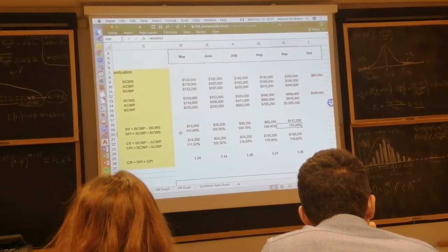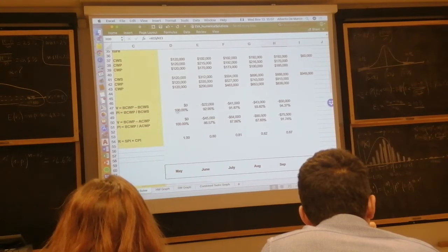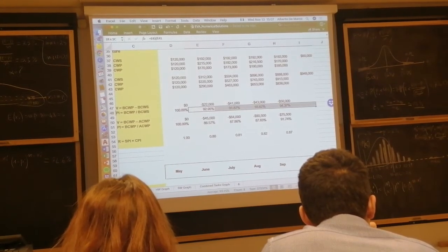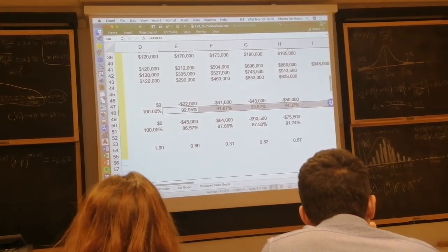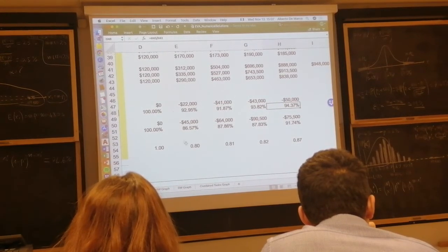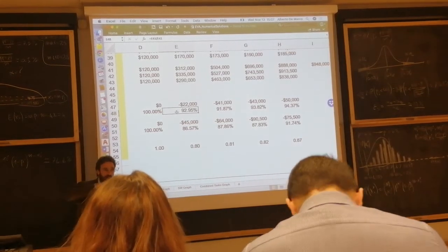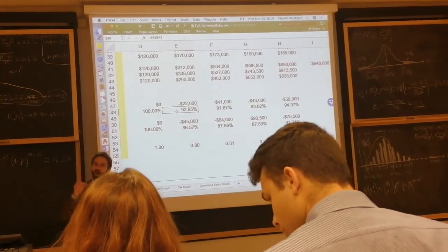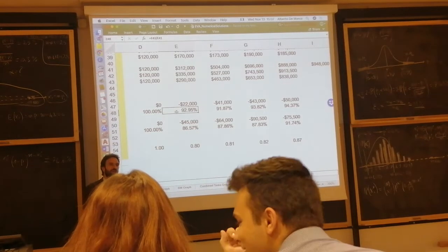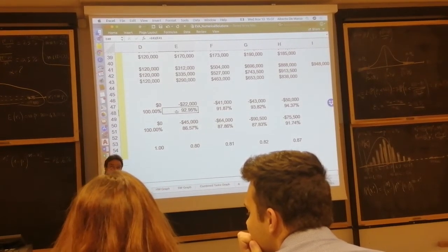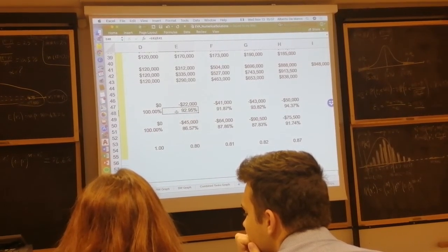And why should you have detected it? If I go into the technical infrastructure, look at what happens. The technical infrastructure is actually doing very bad. But I could have realized that it was very bad not in September, which is 94%. I should have realized it at 93%, since the beginning. And that was the time when the decision should have been made: well, let's put a more experienced technical infrastructure guy, because they are running too slow. I need to recover the delay at that time. And at that time, the control measure would have been effective and very cheap and inexpensive.